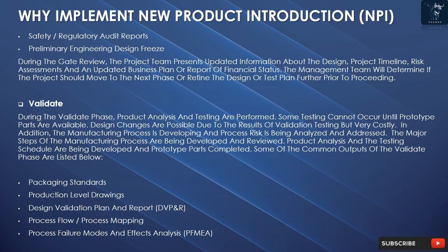During the gate review, the project team presents updated information about the design, project timeline, risk assessments, and an updated business plan or report of financial status. The management team will determine if the project should move to the next phase or refine the design or test plan further prior to proceeding.